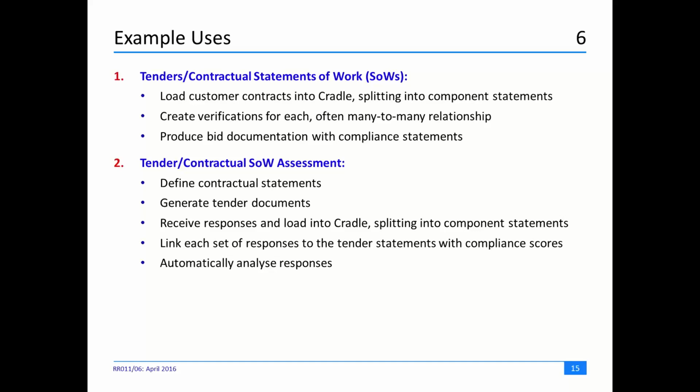So example uses of Cradle: for tenders, contractual statements of work, load the customer contracts into Cradle, split into component parts, create verifications for each, produce bid documentation with compliance statements. If you believe that some degree of automation, some degree of additional control over your bid response process would be helpful, if you believe that it would be helpful to have a more data-focused rather than document-focused process, then Cradle is certainly a candidate tool for you to implement those revised bid response processes.